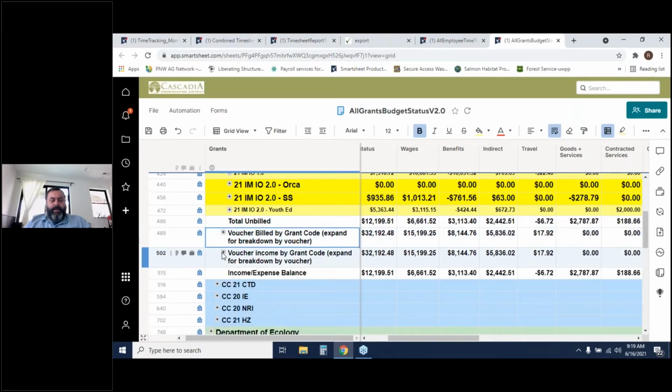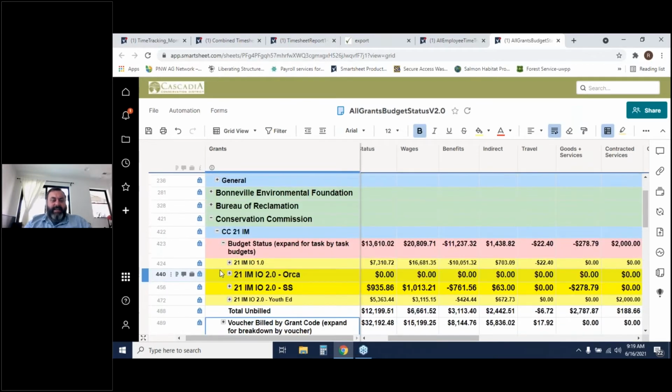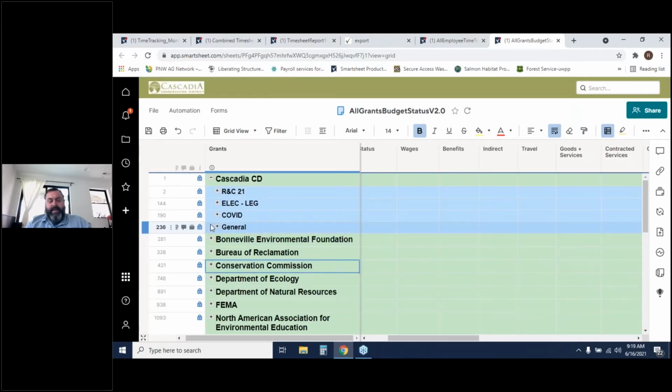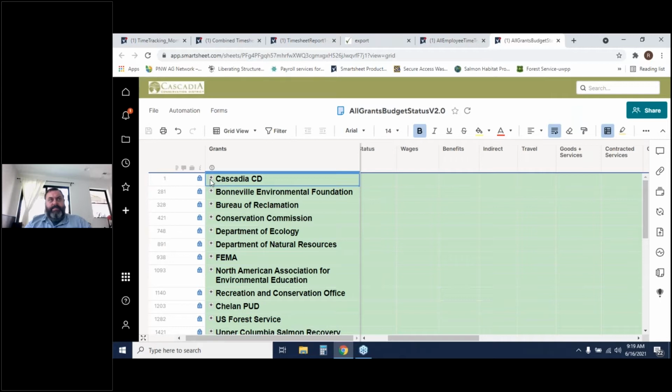And so where I'm at with this is, I can get nearly real time. It's usually going to be about a 2-week delay at the most, just because of the payroll cycle, right? Where it's kind of hard: you can't make formulas off of reports in Smartsheets. That was a hard one for me, because I can't look at the current expenses for the last 2 weeks, but I can at least be as current as last month. So it's a really nice way.